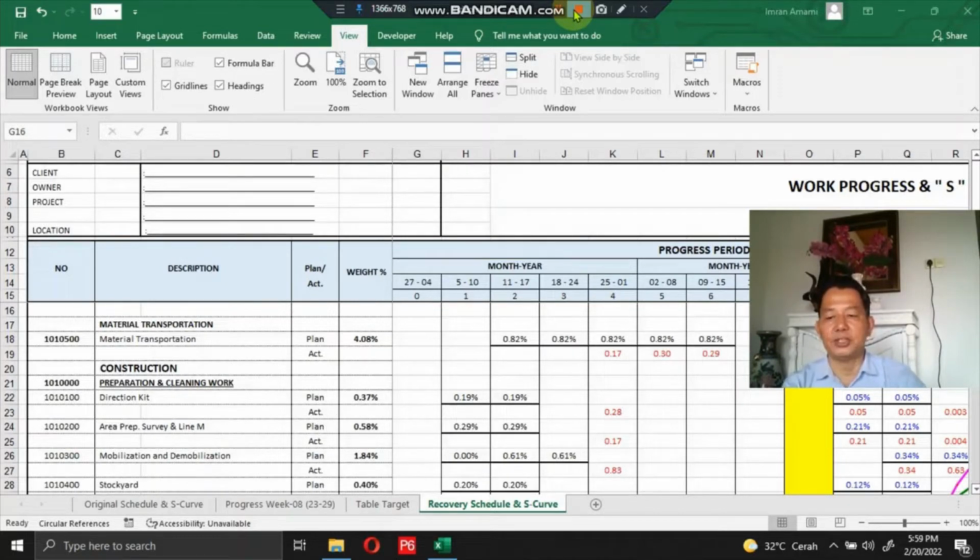There are changes in the scope of work, and changes in the construction drawing because it is not the same as the actual condition of the work on site. Modification also needs to be made due to force majeure events such as natural disasters, floods, landslides, fire, earthquakes, storms, tsunamis, and others. All of these can be causes of delays in the completion of construction work.